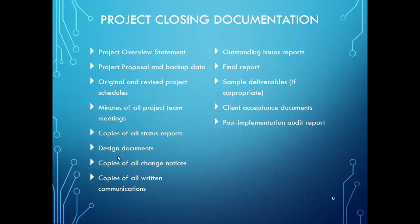This slide shows an example of some documents that should be submitted to the client by the end of the project. Some documents could be submitted during execution and some at the end. For example, meeting minutes could be submitted after every meeting and don't have to wait until the end, while the final report should be submitted at the end of the project life cycle. Some will be submitted after that, in the post-implementation phase — the audit report collecting client satisfaction — and the acceptance document will be at the end.